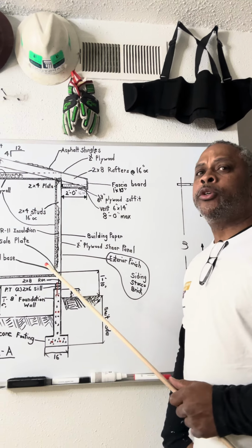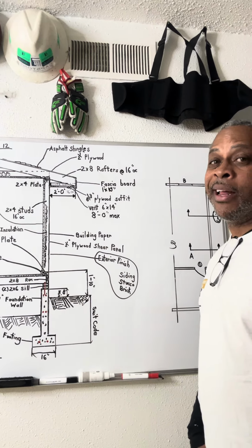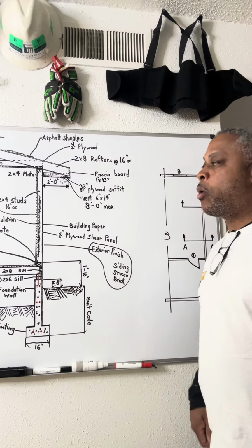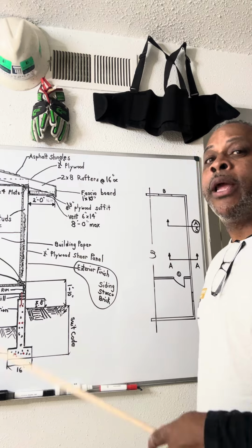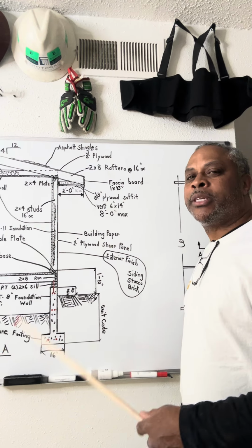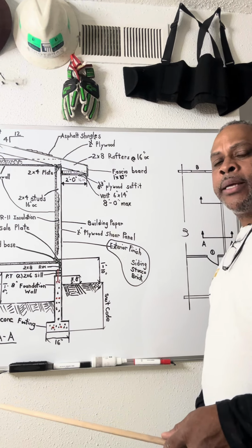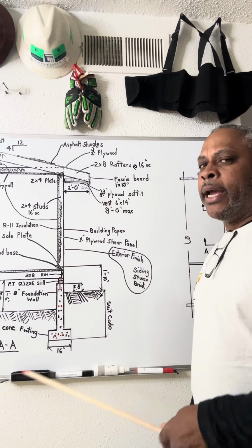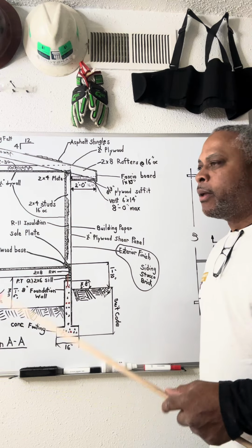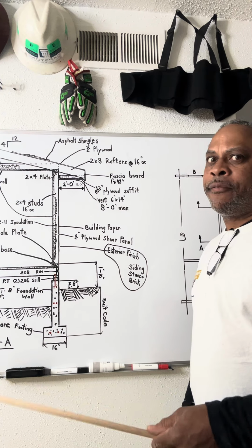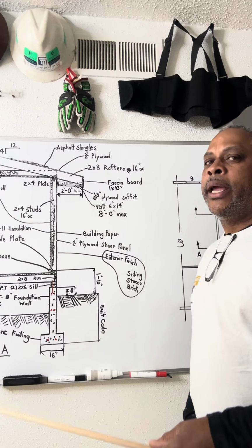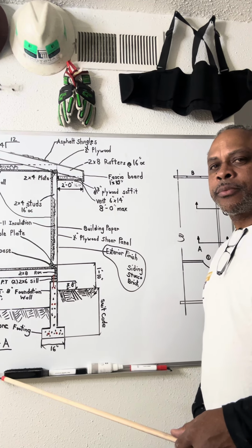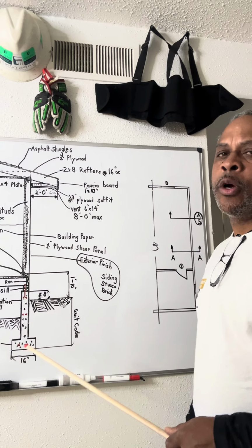When you get into custom, you had better be at $8 and up. When you've got balloon height walls, and it's a house that's never been built before. But if you're in production and you have 3 plans and you know all 3 plans, and it's 20 houses in that subdivision, then yeah, go figure. Your guys are going to get faster each time they get to that house. So you pick up speed and the price is going to go down. But don't cheat yourself though.